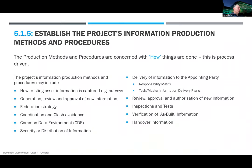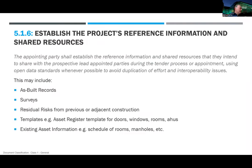There's another document that's really important: the project information production methods and procedures. This is really about the 'how.' How do you do surveys? How do you generate, review and improve information? How do you federate models? How do you do clash detection? How is the common data environment run and set up? How do you distribute information? It's like work methods or work procedures in an ISO 9001 context — it's how you do things. A big thing for us is handover information: how we get information in the format we want. Everyone tends to think about it at the end, but it really needs to be thought about from the beginning.